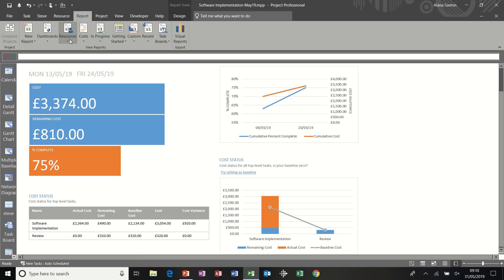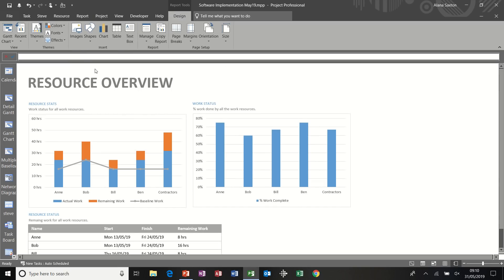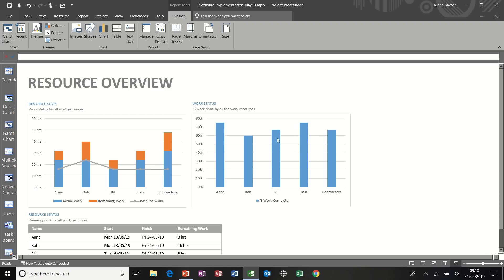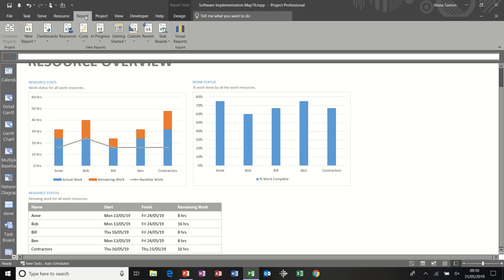Another one. Let's have a look at resources. Resource overview. I quite like this one. So it basically tells you what work's been done against baseline work. So you can see quite clearly there, a lot more work has been done, or is planned to be done, as opposed to the baseline. And then this is the percentage work complete for each resource. And then you've got that same information in the table.